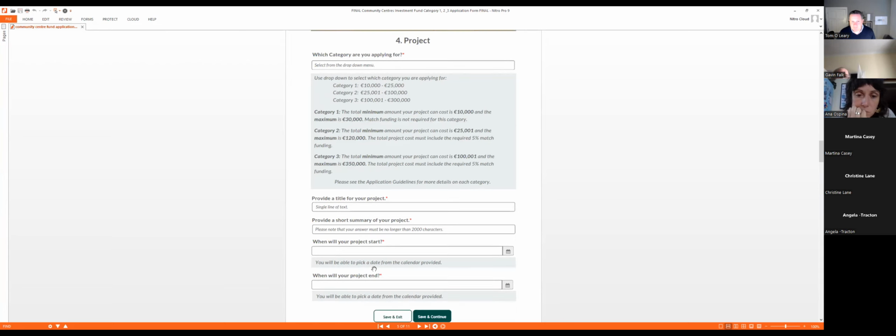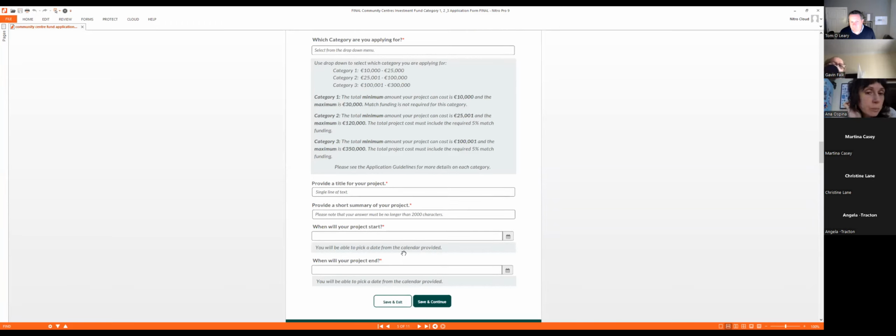When your project will start. So you download this calendar here. You click on calendar, and you pick a date on the calendar. Okay. If you don't know, you might think, okay, the grant is going to be assessed in July. You might presume that it's going to be announced probably in September. So you might put on a start date of October. Okay. And normally it depends on the project. If it's a very large construction project, you might give yourself 6 to 12 months. If it's a smaller project, give yourself maybe 3 or 4 months. Okay. They normally don't stick you to these dates.